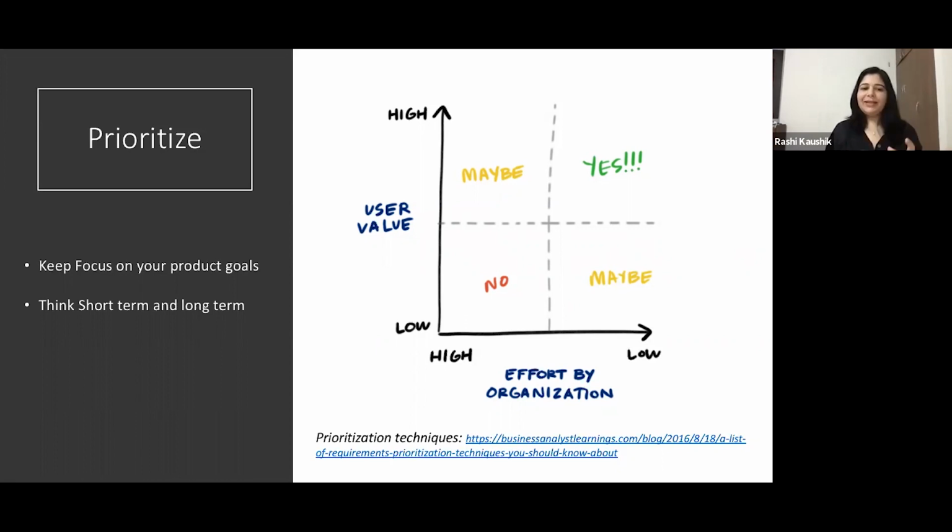And then what I do is I place all my ideas which have been categorized into the 4 quadrants on this matrix. So anything which is high value and low effort are quick wins and should definitely go on top of my backlog. Similarly, whatever is low value and high effort should, I guess, be eliminated. Now, the problem is with the other 2 quadrants. For the ones which are low value and low effort, you might not want to drop them immediately, and you might need to analyze them more. Now, these can act as good fill-ins for you, and you know what I'm referring to here.